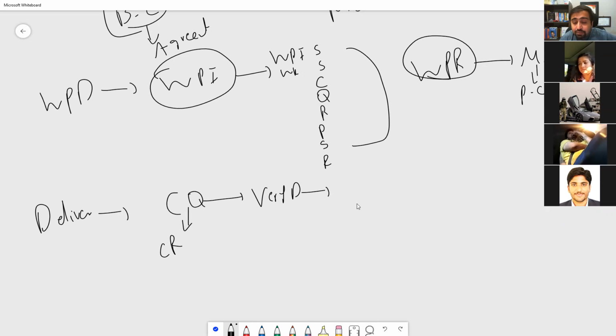Then this deliverable goes to validate scope. Here the internal team was doing inspection in the previous step; here the client comes and does the inspection, and if they accept it, it becomes an accepted deliverable. If they reject it, it becomes a rejected deliverable and goes back for change. Once the change is approved, it goes back to execution for implementation.